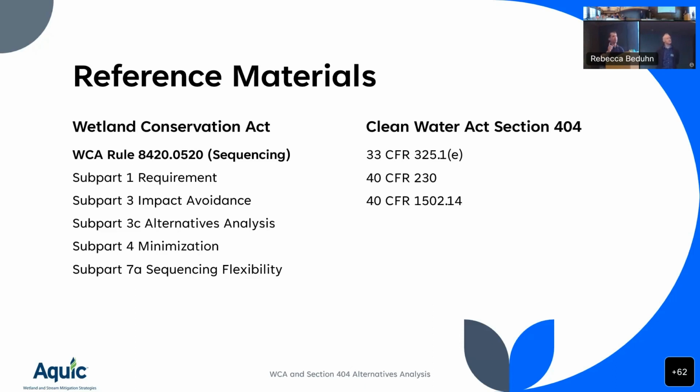So you need to be very careful if you're involved in preparing a NEPA document for a project. You can't just take that and drop it on your permit application and expect to get through the process. It may not work. So you can comment on that, Chad, if you want to highlight anything else. But I think that's an important distinction.